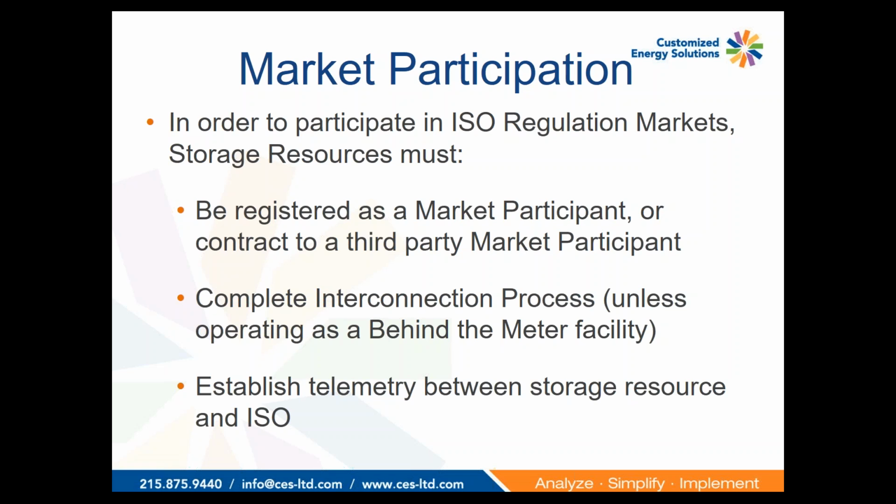Also, the interconnection processes will vary by ISO, and as Jackie mentioned, their rules are being reviewed, but most of the time a storage resource will have to follow a very similar interconnection process as a generator would follow, which can take in the neighborhood of 12 to even 18 months. So there is some lead time to account for there.